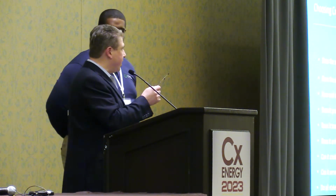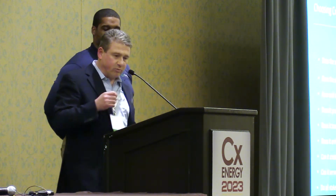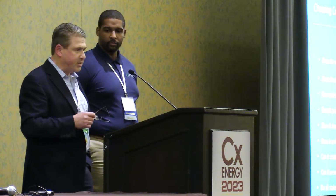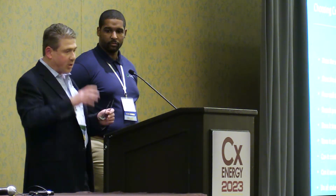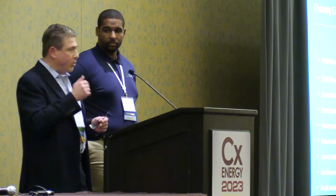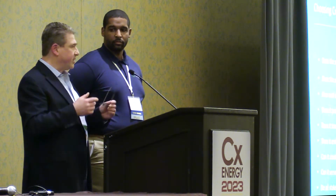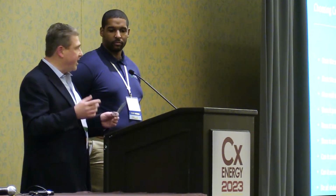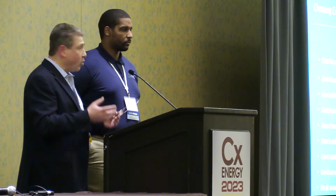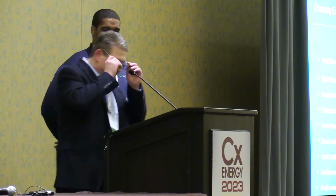Now, you also need to figure out, when you say does it integrate with the CMMS system, what does that mean? Is going through an Excel file sufficient, or do you have to have an API? Or maybe there's another process of data exchange, maybe through a BIM file, like COBie, for example, right?